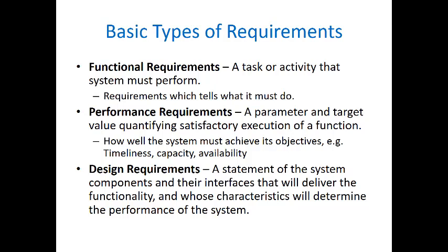However, also let's assume that the mayor of the city of LA tells you that we have some collaboration with the Department of Transportation, and we also want to collect some data on our customers. So we want to collect data on how many bikes are rented out every day and for how long our customers rent the bikes. So the system that you design should be able to collect this data and save it in a database and record it every day. If there is such a requirement, that's more like a function that you want your system to perform. And such requirements go into the category of functional requirements.